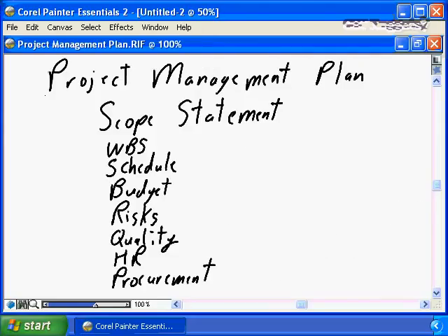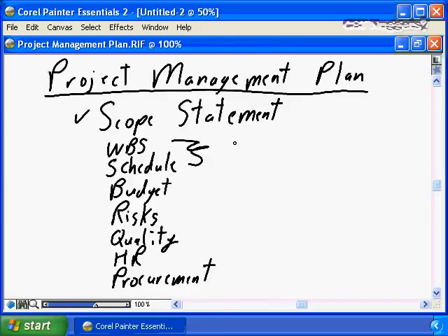The end result of the planning process is the development of the project management plan. No surprise, the project management plan is going to contain each of the components that we just talked about. A very well-defined, very specific, clear, unambiguous scope statement. It needs to define the elements of the WBS and the schedule. I often find it's most effective to simply combine that and provide screen prints from my scheduling tool, because a good screen print of a well summarized proper level of decomposition in the Gantt chart from a Microsoft Project does an excellent job of delivering both the project WBS and the project schedule.